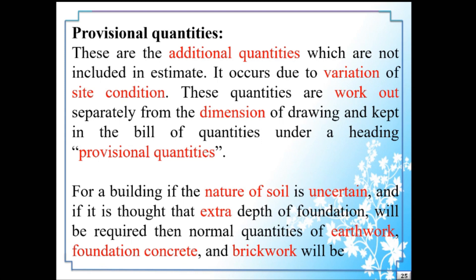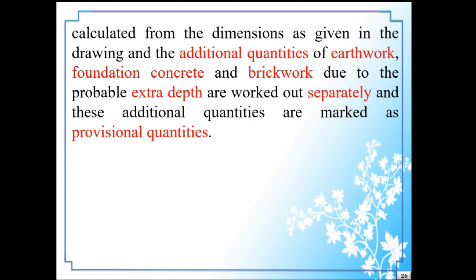For example, for a building if the nature of soil is uncertain and it is thought that extra depth of foundation will be required, then the normal quantities of earthwork, foundation concrete, and brickwork will be calculated from the dimensions as given in the drawing, and the additional quantities of earthwork, foundation concrete, and brickwork due to the probable extra depth are worked out separately. These additional quantities are marked as provisional quantities.